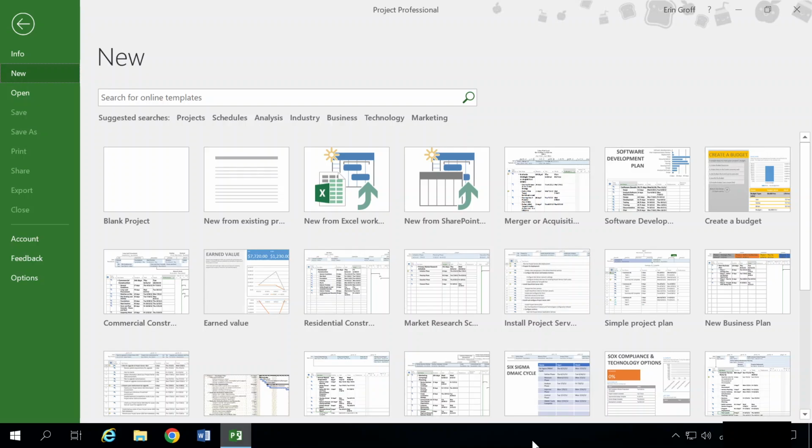You need to see which tasks are driving the finish date and then explore ways to fast track any of them. You begin by displaying the critical path. There are a number of tasks on the critical path. It looks like you can select the printing vendor faster if another resource could be assigned to that task. You can also speed the project along by starting the grammar checking task while the graphics are being developed. You make these adjustments to optimize the plan.